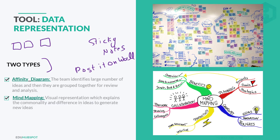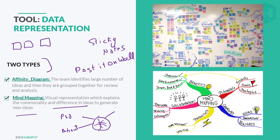Mind mapping is a visual representation that explains commonalities and differences in ideas to generate new ones. You backtrack ideas — for example, starting with website development: you need a product page, about us page, classroom page. Then drilling into product: you need a simulator, ITTO sheet, videos, questions, slides, templates. You start at a high level and develop into much more detail — that's mind mapping.